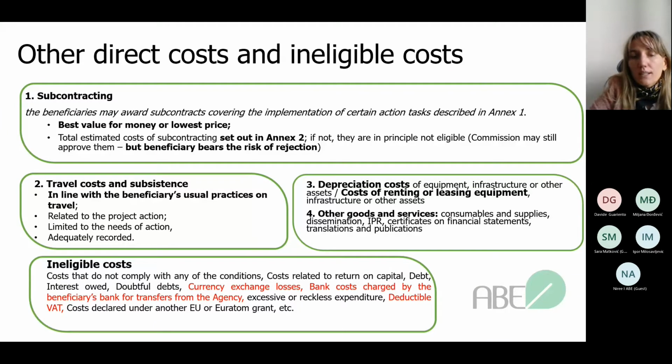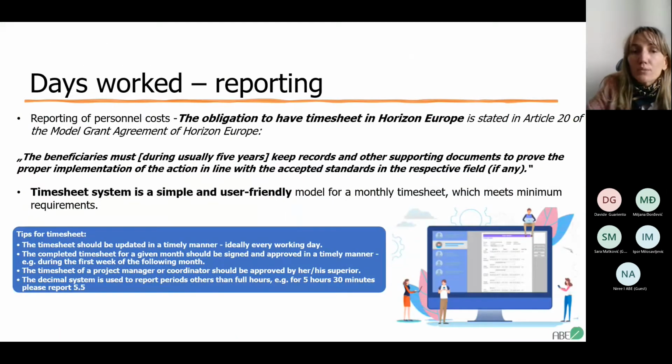Ineligible costs, again, the list is the same for ineligible costs within the project period. Of course, these are costs that do not comply with any of the conditions, so you may say they are ineligible costs. At the end, during the project time, we have a reporting period, so days worked. The obligation is actually to have the timesheet in Horizon Europe.